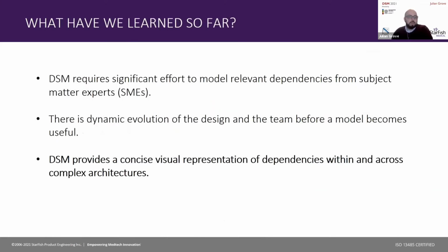So what have we learned so far, newbies to the DSM world? Well, we know that DSM setup requires significant effort to model the relevant dependencies from subject matter experts, even in this relatively simple postmortem example. And we recognize that there's dynamic evolution of the design and team before a model becomes useful. So starting too early could lead to unnecessary rework. And finally, perhaps most importantly, DSM provides a concise visual representation of dependencies within and across complex architectures.